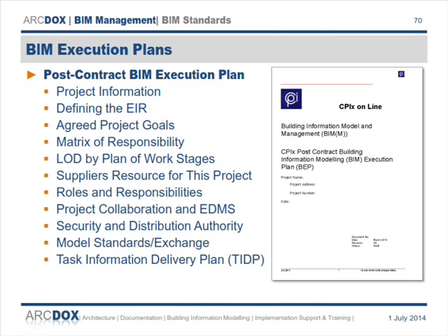No, it is. And part of the problem there is it is going up quick. It's going up too quick. One thing that's key on a project, if you're involved in a BIM project, is to make sure that when subcontractors are being appointed, that they have sufficient time allowed for them to get their information into BIM and coordinate it before they actually start.